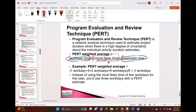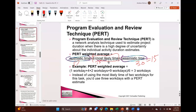Here's an example: driving to work. On a good day with no traffic, it takes 10 minutes — that's the optimistic. On a bad day with heavy traffic, 30 minutes — that's the pessimistic. On a usual day, 15 minutes — the most likely. So: 15 times 4 equals 60, plus 30 plus 10 equals 100, divided by 6 is about 16.7 minutes, roughly 15–17 minutes on average. That's PERT — it reduces risk by using the optimistic, four times most likely, and pessimistic, divided by six. A great technique for estimating activity durations.